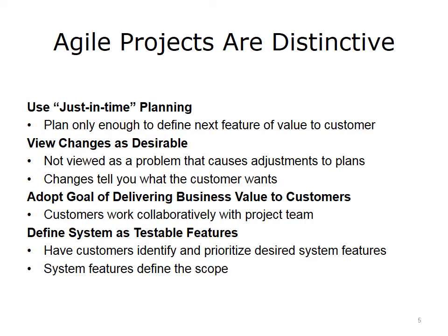Agile challenges all of that. Instead, you use just-in-time planning, which plans only enough to discover the next feature or value to a customer. Instead of thinking that change is undesirable, Agile views it as desirable. It's not a problem.